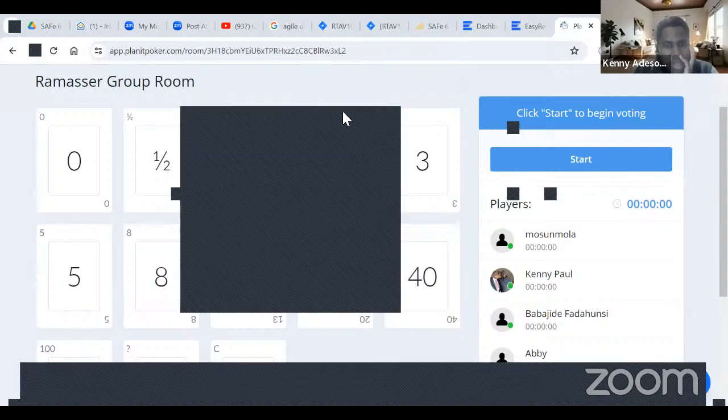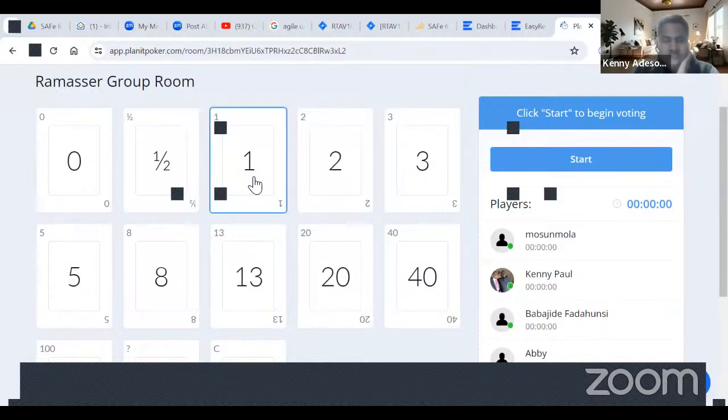Okay. So, guys, pay attention here. A story that is estimated as 1 is something that will be developed and tested in just 1 day. That's what 1 means. Pretty easy, to be done quickly. After that, 2 is a little bit more complex than 1. 3 is more complex than 2. 5 is more complex than 3, all the way to 13.